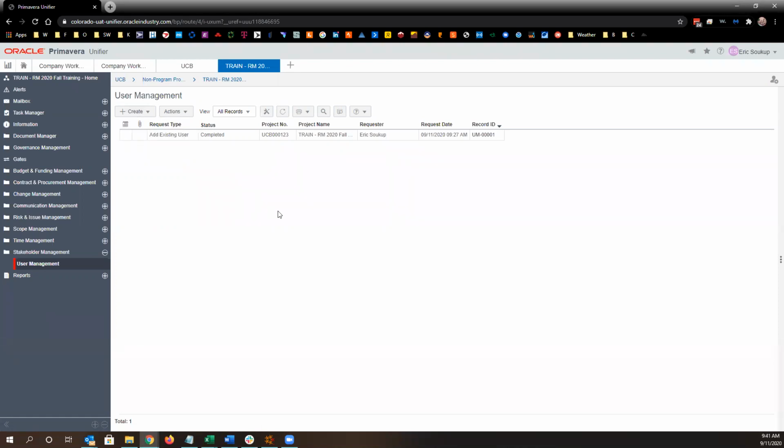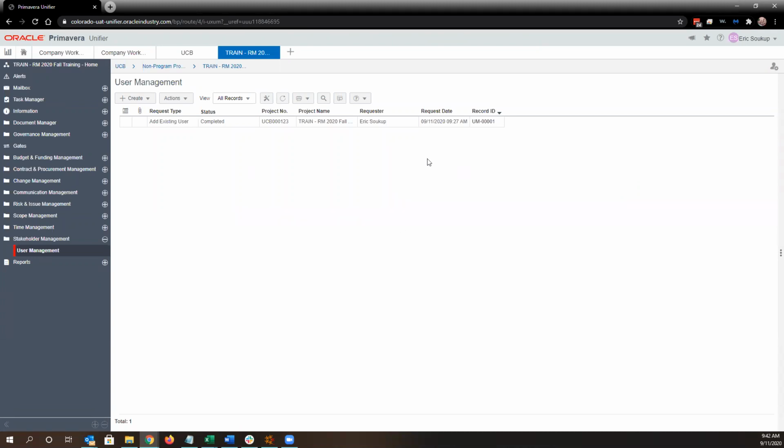First, we want to validate that they don't have any current tasks. Because if we remove them from the project or inactivate them, their tasks will be stuck with them. They won't be able to complete it. And if the task has only been assigned to them, then nobody will be able to complete it. We'll need to get an administrator involved to sort it out.